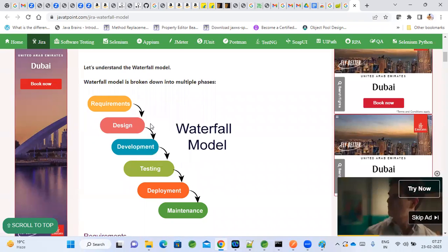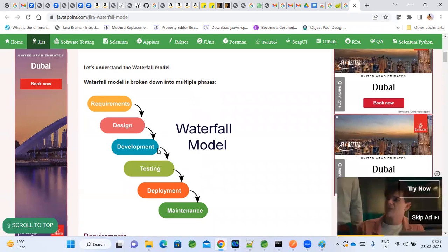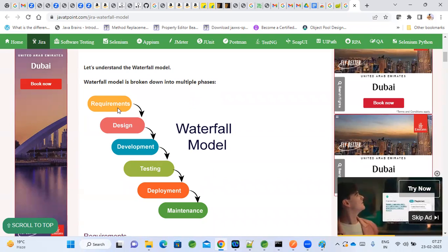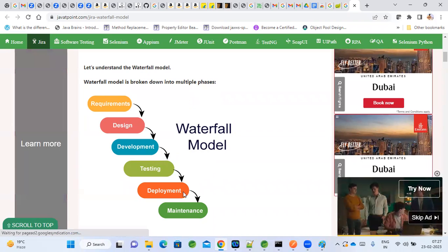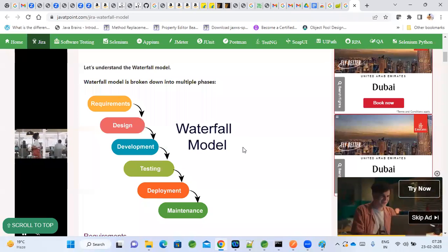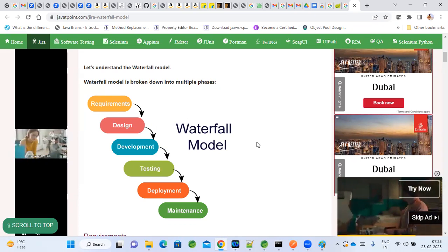But in Agile, what is going to happen? Sprint by sprint, we do the same thing, which means if this product management system has 10 modules, only the first module's requirements he will give. The remaining modules, he doesn't give to us. Or else he will explain them to us, but we'll ask you to implement only the first module. So first module requirements only we will collect, then design, develop, test. Maybe it will finish quickly, in 1 month. So by next month, if GST is coming in, he will change his requirements in the next coming sprints, so that as a vendor, we should not say no, and he can add anything. That is the benefit to the business from Agile.